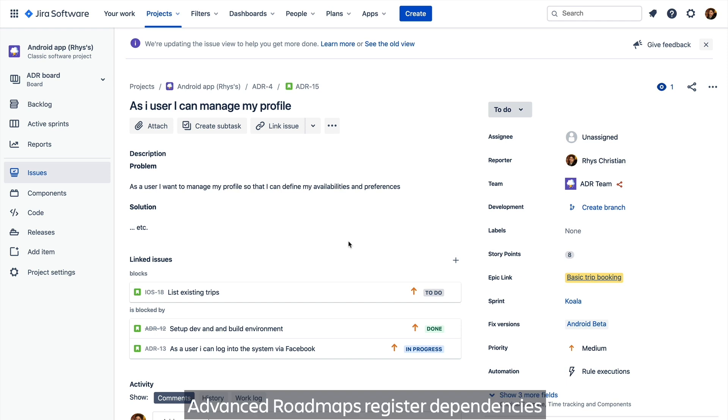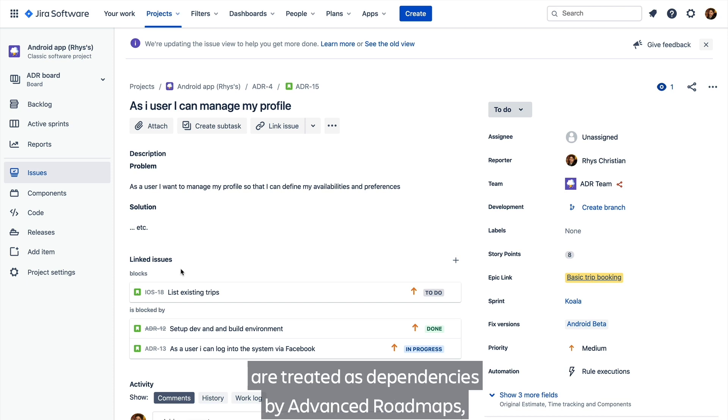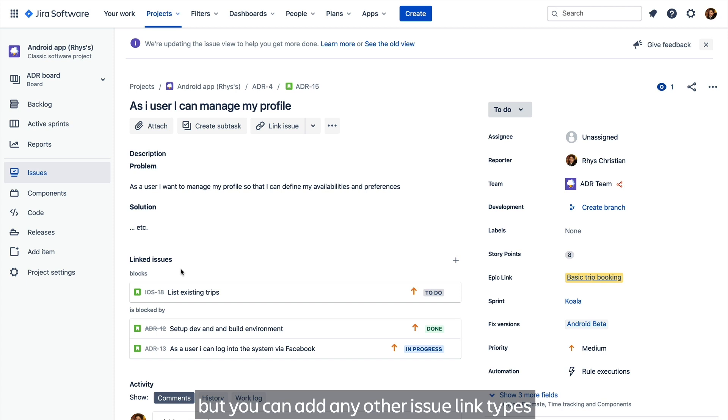Advanced Roadmaps registers dependencies via issue links between Jira issues. Out of the box, only blocked and blocked by issue links are treated as dependencies by Advanced Roadmaps, but you can add any other issue link types to be regarded as dependencies.